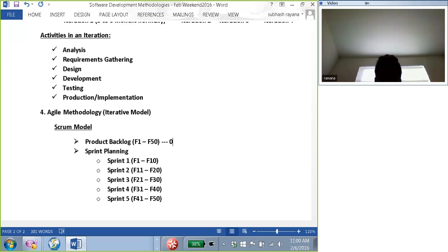And also, while allocating, as part of the sprint planning, first of all, who performs the sprint planning? It is the project manager. The project manager will talk to the business to prioritize, and will also talk to the technology team to evaluate the time required. Because if each sprint is 4 to 6 weeks, they have to make sure that whatever they are planning to implement in a particular sprint is actually doable within 4 to 6 weeks, right? So all those are discussions that the project manager is going to set up with the technology team and the business, and then come up with this plan.